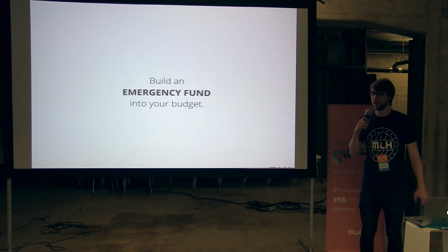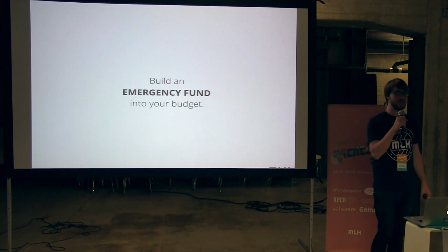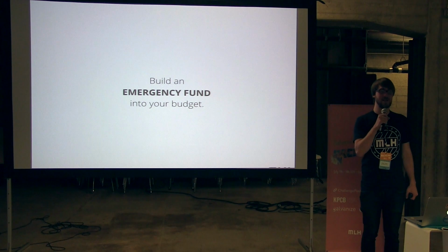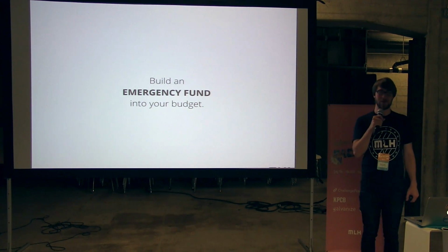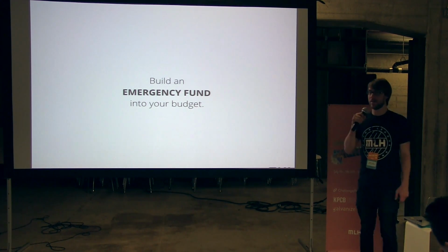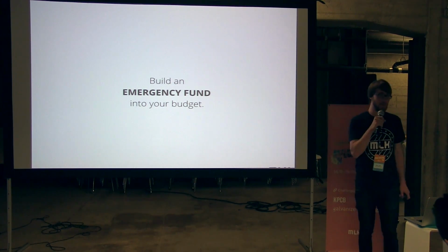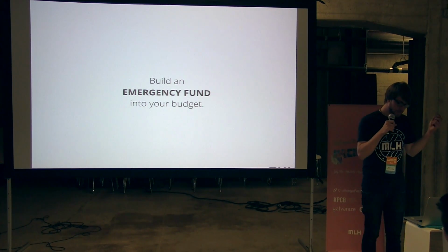Build an emergency fund into your budget. I promise you that when you get to the point where you're a couple days out from the event and you're like, oh my God, we're completely over budget, what are we going to do? This will be the first thing you cut if you have it, but having an emergency budget that you can reallocate later, or you can use when things pop up during the event, is a really, really good idea. I usually recommend that people set aside about 10% of their total budget when they estimate this.